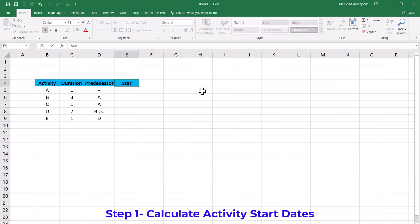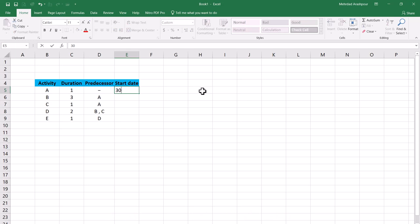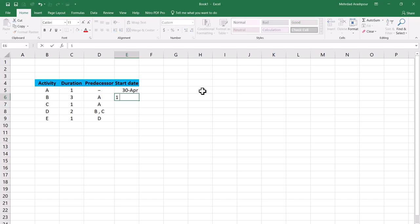Step one is to calculate the start date of each activity based on the project network logic. In this example, we can assume a desirable start date for the first project activity. We have chosen 30th of April to kick off activity A. Since this activity has a duration of 1 and it's a predecessor for activity B, the start of activity B will be on 1st of May.